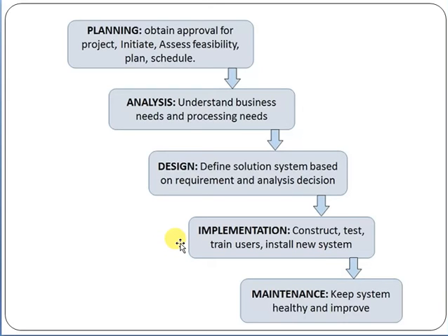Then the next one is the implementation phase. Implementation means the coding, the software development. The software developers and software designers will engage here. They develop a system, which requires at least 3 to 4 months for e-commerce solutions, in which all the product catalogs and functionality will be developed by the programmers, software developers, software engineers, software designers, and database engineers. The application team will get involved here and develop the system. That is called the implementation. They do all the development as per the scope defined, as per the functional specifications defined.